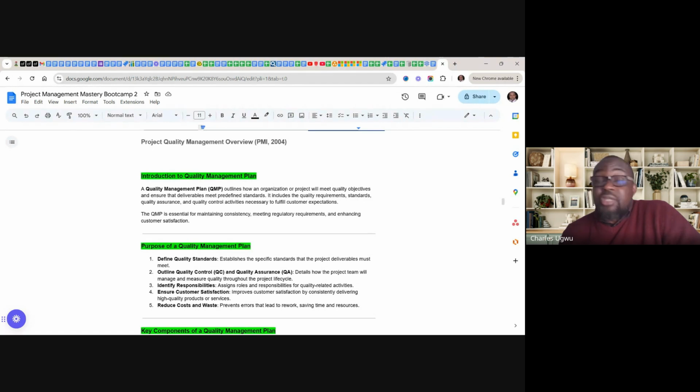It covers regulation a lot. I often use health and safety. In a project, if you have a good quality management plan, mainly in construction, it states the method statement. Within the method statement, it covers how everything must be done, even the health and safety requirements, what needs to be done and what needs not to be done. These are qualities you need to maintain.